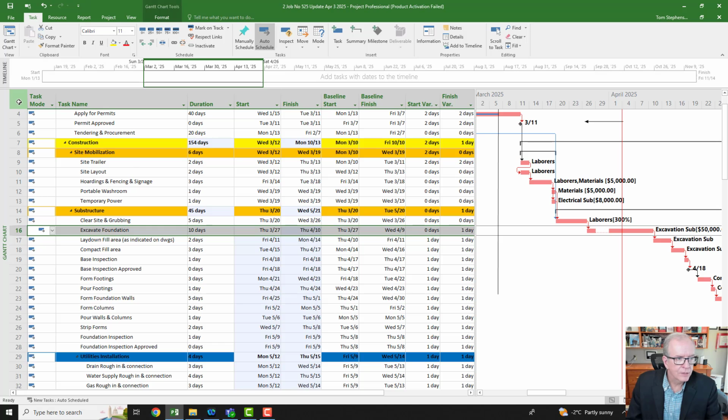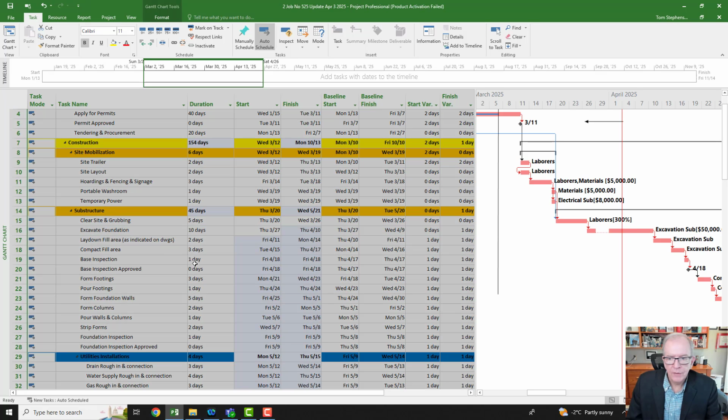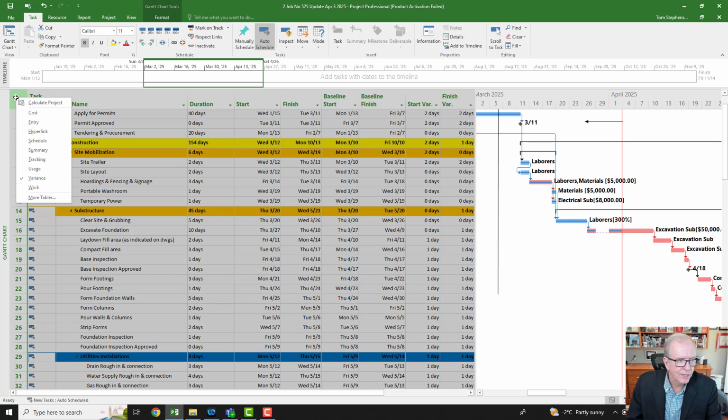So you know what? I'm going to select everything. Now that everything else is okay, this is the oddball one. Guess what? I'm going to do mark on track. And it marks everything on track up to that status date. Sometimes you'll find Microsoft Project gets a little funny there. And I bet you this, if I go look at it, it's going to say 99%.